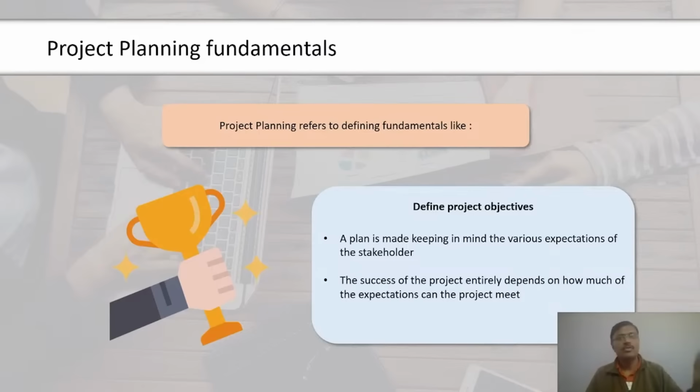That is, control costs. Control costs is the process of monitoring the status of the project to update the project budget and managing changes to the cost baseline. Updating the budget involves recording actual costs spent to date. Any increase to the authorized budget can only be approved through the Perform Integrated Change Control process. Some of the typical activities that happen as part of the control costs process are ensuring that cost expenditure does not exceed the authorized funding, monitoring the cost performance to understand variance, and monitoring the work performance against the funds expended. The inputs to the process are the project management plan, organizational process assets, project funding requirements, and work performance data.